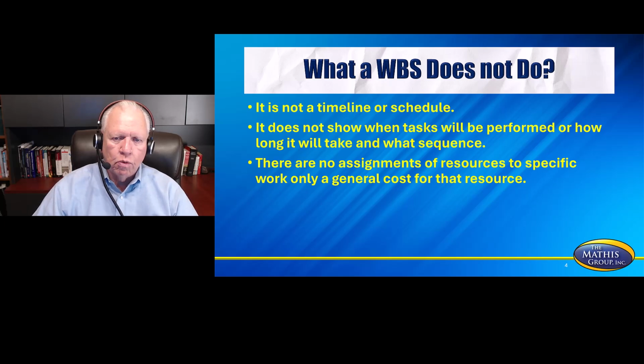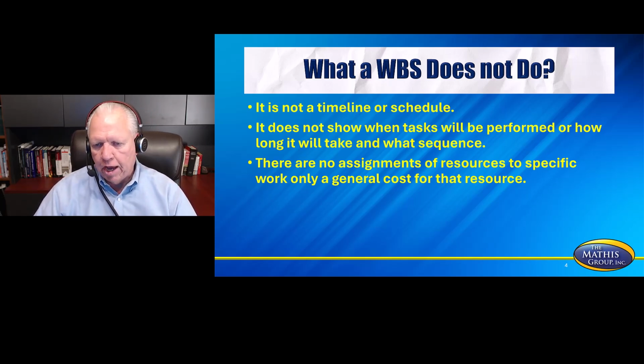So it doesn't show when tasks will be performed, how long it's going to take, or in what sequence. It just shows chunks of work in that particular graphic. And so there's no assignment of resources. You're just saying we think it's going to take 15 hours to do that. And so that's what you're looking at with that.